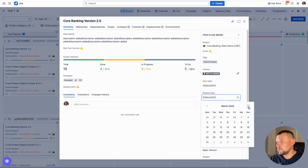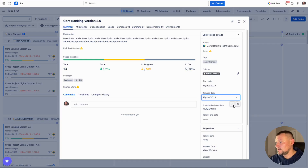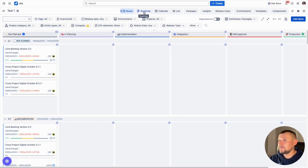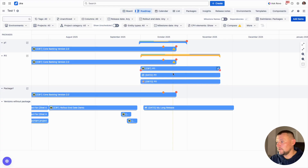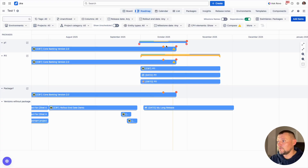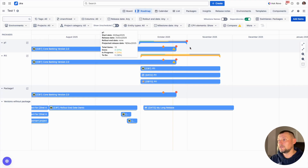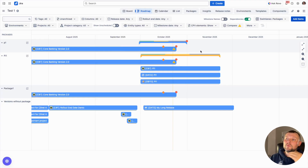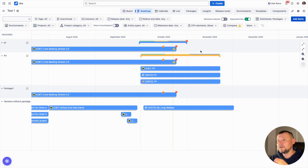Let's look at this milestone. I will update the dates of my release, and now I can see my milestone on the release on the roadmap. We can also track whether it was achieved or not. With milestones, we can show a level below releases and track intermediate events that belong to a release.